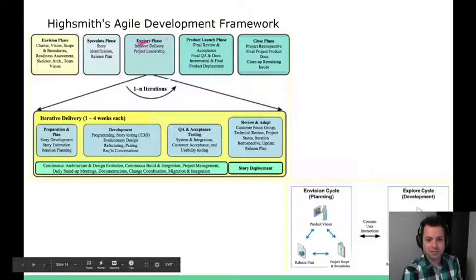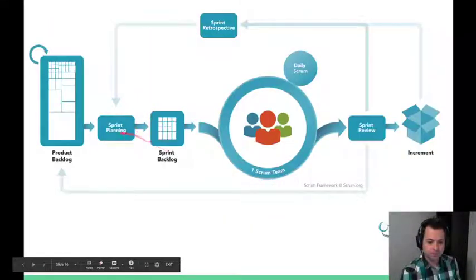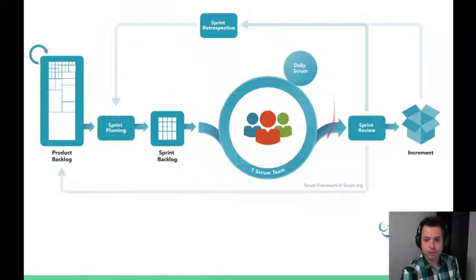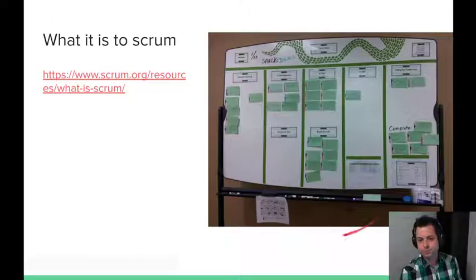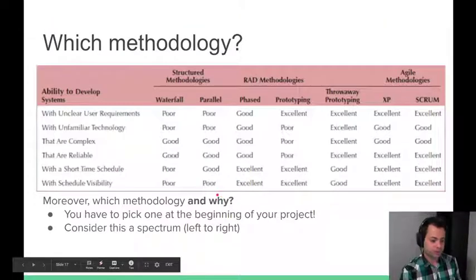You have your explore cycle. Again, this is the explore phase where we have an iteration plan, where if you go to Scrum, we have an iteration. Sorry, I should follow the arrows. You have an iteration, you're going to do your development tasks, you'll do your reviews internally and externally, make changes to your plan, and keep going. At all of these phases, there will be user interaction, there will be client interaction. So there's a lot more ownership.